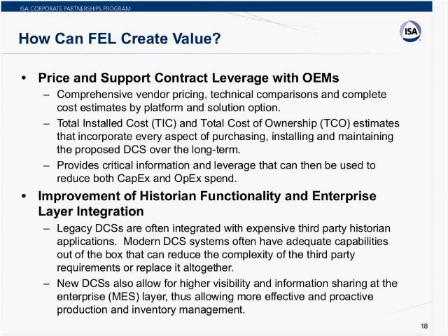The other thing is, I think I touched on this earlier, total installed cost, so that upfront cost should be estimated as well as total cost of ownership. So as you look at different options and different solutions, you should look at, what's it going to cost me to buy the car, and then what's it going to cost me to operate and own the car for 10 years. That's my analogy, and both are important. And it's interesting to look at that across different solutions, different platforms, and then compare those. And having all that data then helps you as an end user negotiate and come to a good, fair agreement with your suppliers. And so, again, kind of the last point, it provides critical information and leverage, fair leverage, to be used to reduce both CapEx and OpEx spend.